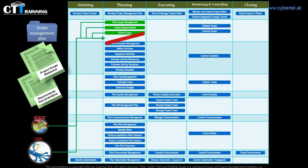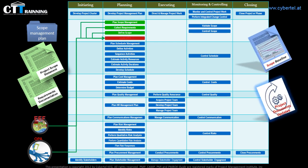After performing the tools and techniques, we came out with the scope baseline and project document updates. The scope baseline will be needed in seven other processes: in the develop project management plan process, because it is a part of the project management plan; in the define activities process; the estimate costs process; and determine budget. Also, we will need it in identify risks and perform qualitative risk analysis processes, and we will need it to validate the scope in the monitoring and controlling process group. The second output is an updating activity for the project documents, such as requirement documentation.